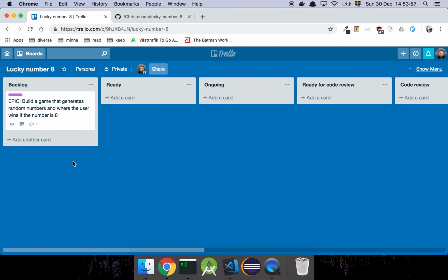The second step is that the team sits down with the stakeholders, either a project manager or a team lead or something like that, and they're going to pick the cards that are the most prioritized for the company at that given moment. In other words, the stakeholders need to express that, hey, this is more important to start work on than this, and then we prioritize this backlog accordingly. Now, this may change many times, but that's the basic idea, anyway.